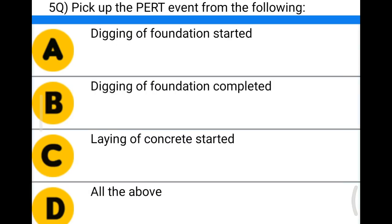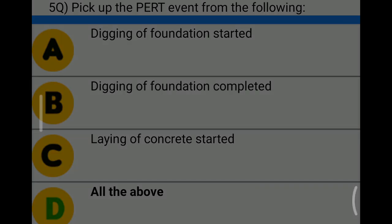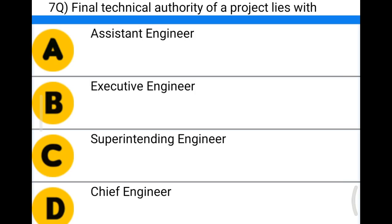Next question: pick up the PERT event from the following — Option A: digging of foundation started, Option B: digging of foundation completed, Option C: laying of concrete started, Option D: all of the above. The correct answer is Option D, all of the above.